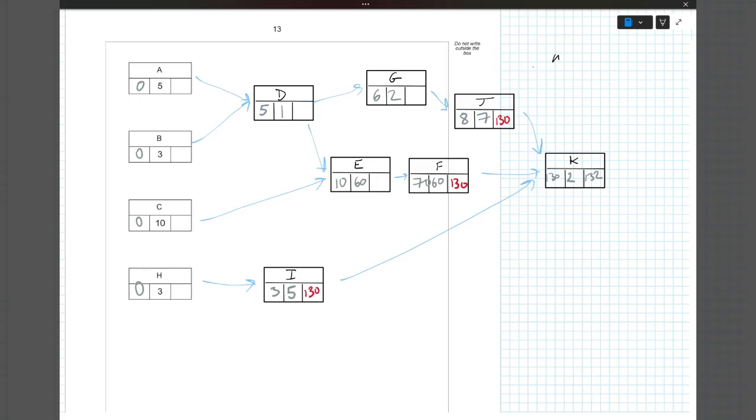And then if we work backwards for I, 130 take away 5 is 125. So if H is done at 125, add the 5 for I, it's 130, and we're still okay. So we're just making sure that some of these parts can be a bit delayed, but we can still get it done by the end. This is all assuming that you've got a few people actually working on it, because you can't just have one person doing it, because some of these jobs won't get done.